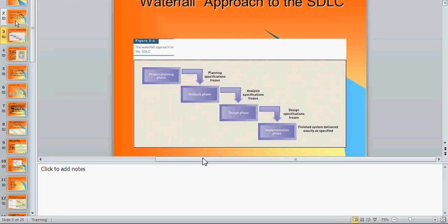Now these are the 4 phases, and this is always the sequence. It goes from initiation to requirements to design to implementation. All right? So if it is linear and sequential, the sequence will always remain the same. Linear: once you have done your project planning and initiation activities, those outputs are frozen in time. You have planned. Going forward, the minute all your planning activities are complete, you officially get into the next phase, which is the analysis phase. You will analyze based upon your planning.